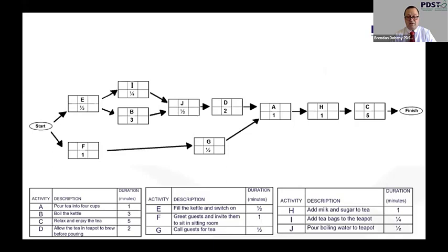We've already identified 2 central components of the 6-box grid, that of activity and duration. So we direct your attention to the top left and top right of that grid. We'll have start and finish. So the start time plus the duration would be equal to the finish time.